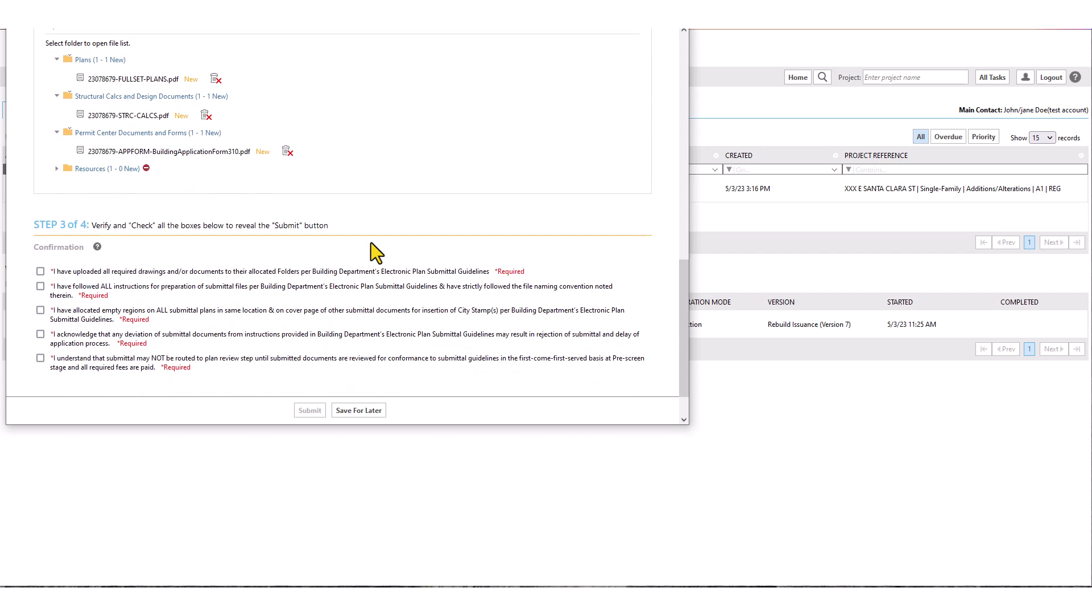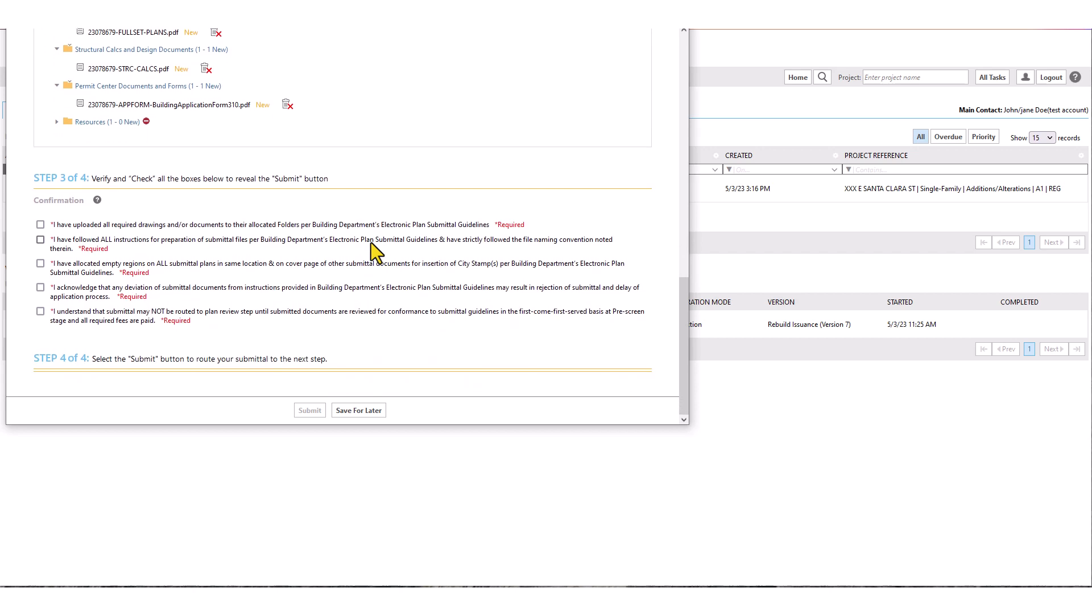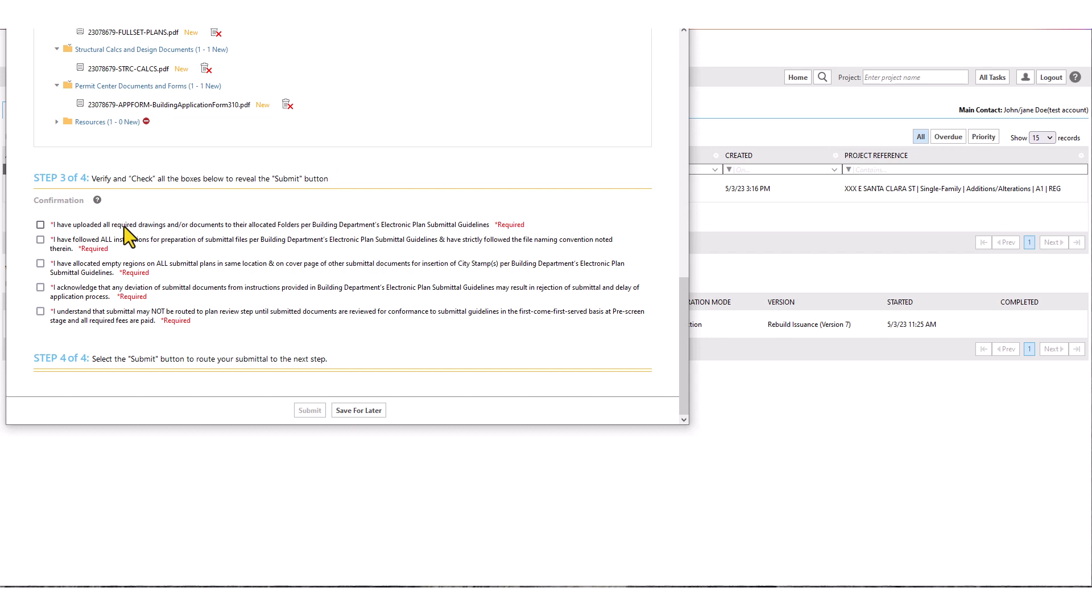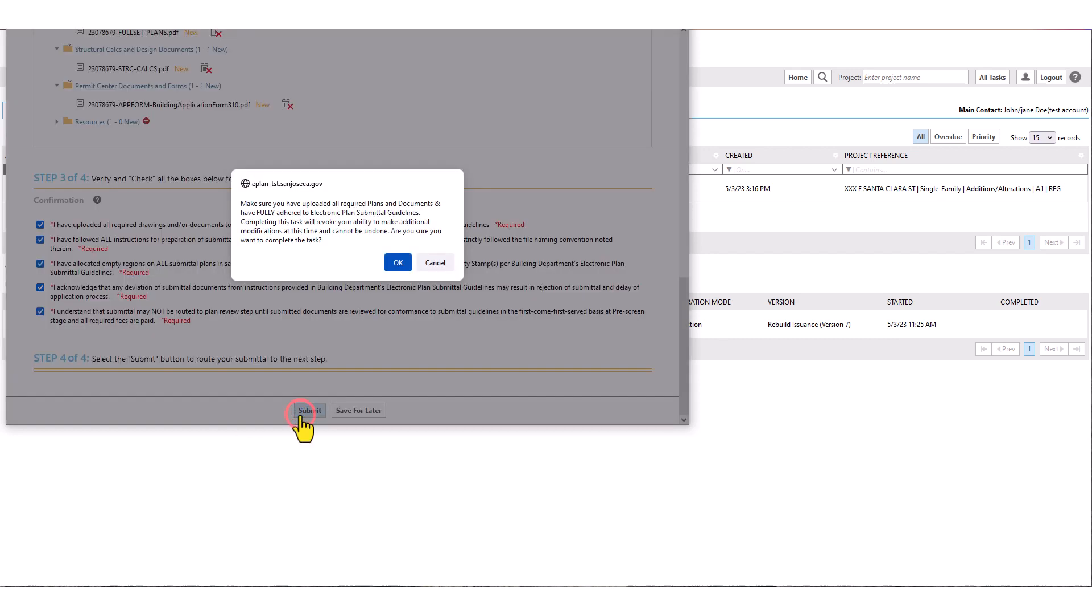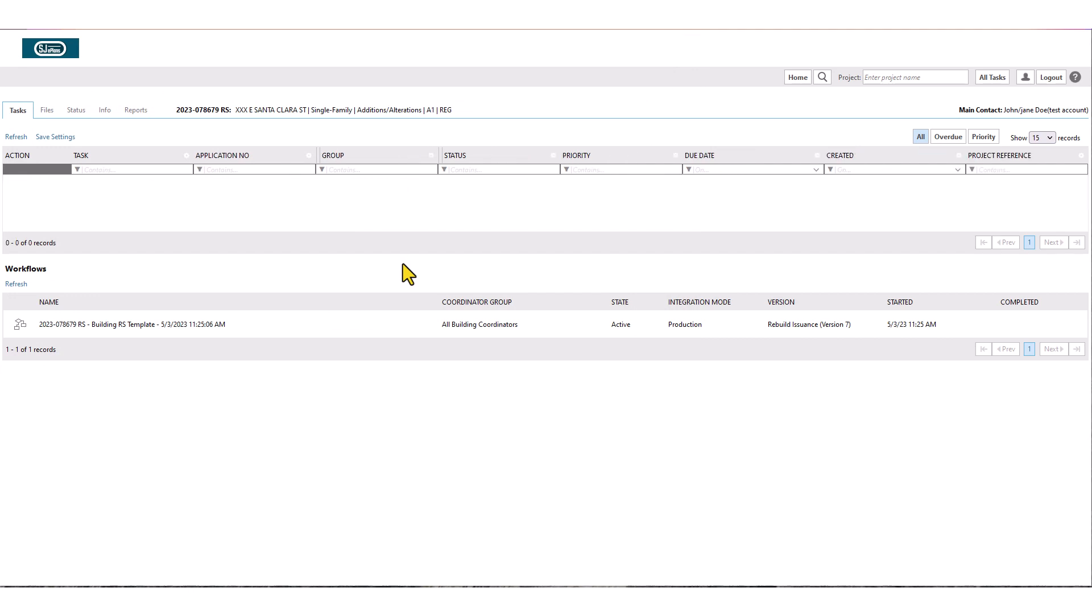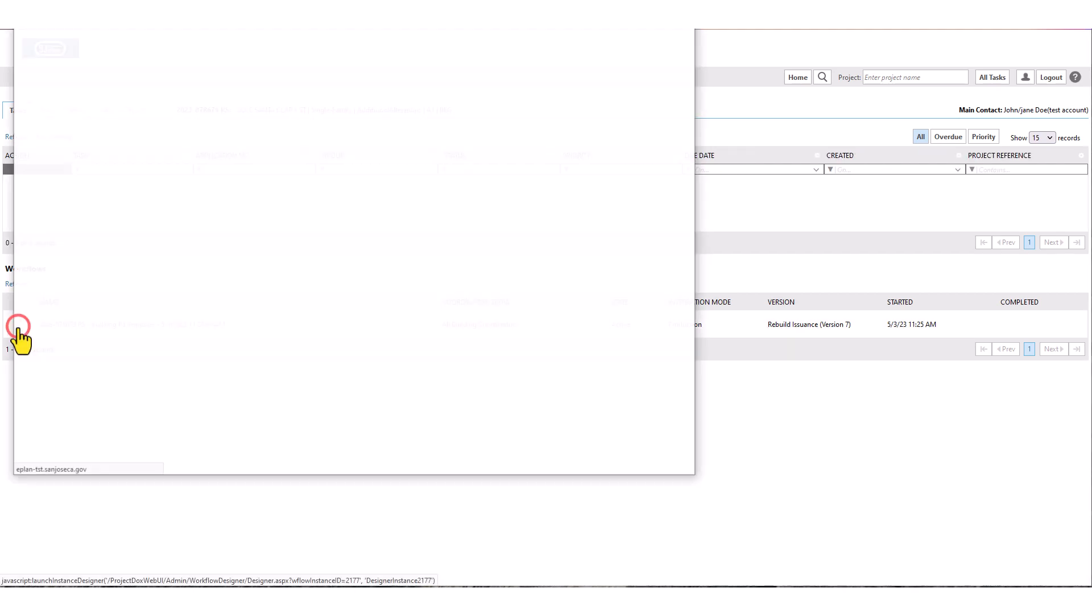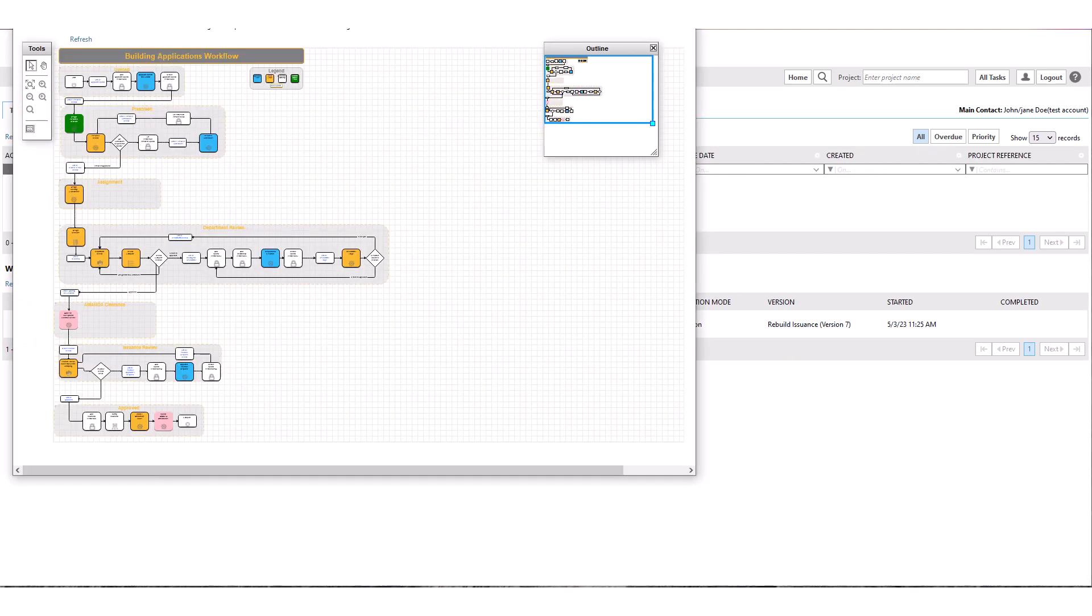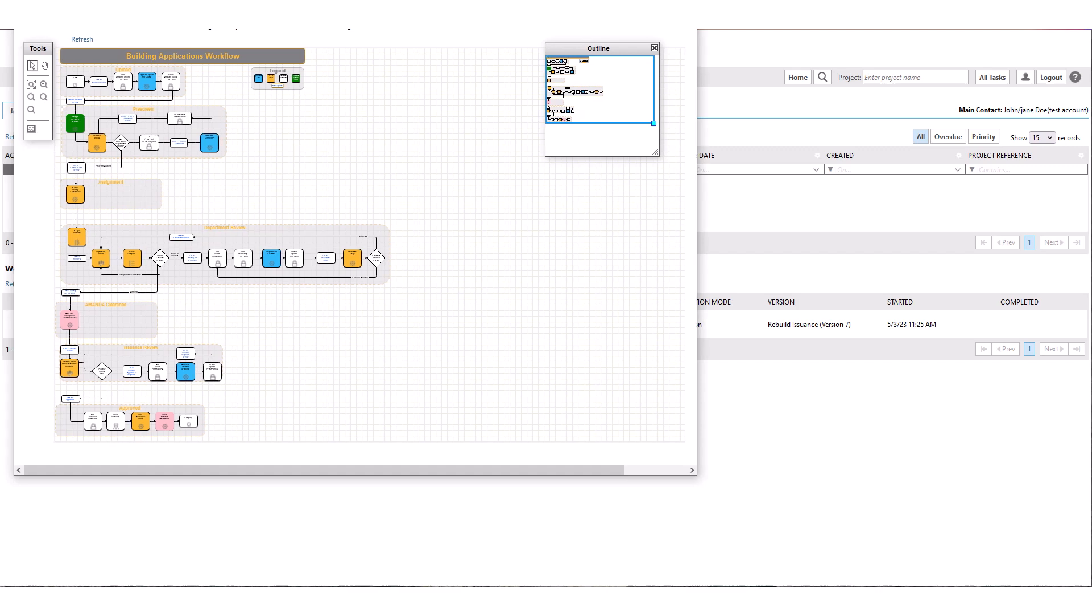Once you have completed the upload process, scroll down to last section of your task. Review all messages shown, check to confirm and acknowledge each item to reveal the submit button. Then click on submit. You will receive one last message warning that you would not be able to make any changes to the application beyond this point at this time. You must confirm to continue. At this point, your application has moved to next step for intake, which can also be seen in project workflow.